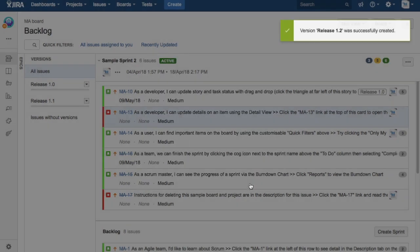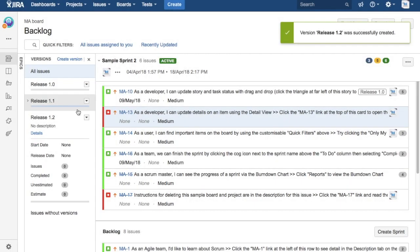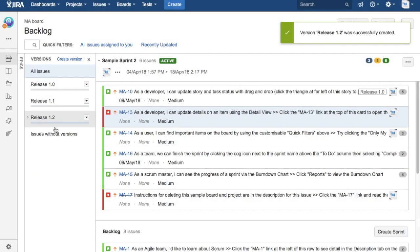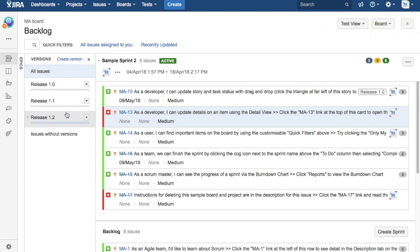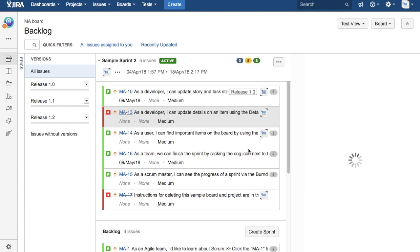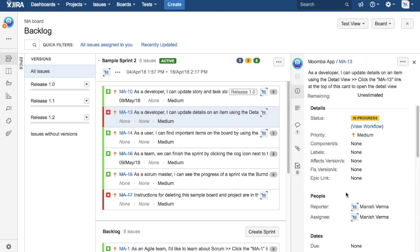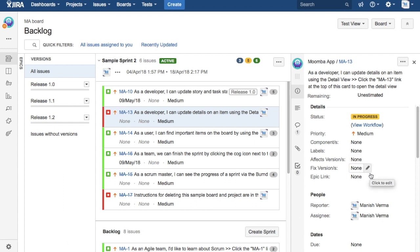To add the issues in the releases, you can either go to the issue detail, click on the issue and update the version. You can update the fixed version.